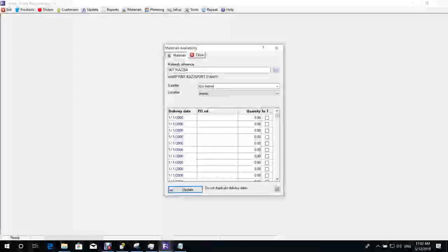It could be either a critical path activity, or we can show the material lead time in the first tab, against the material records. Those 45 days that the accessory needs to arrive into the OEB. Not standard, maybe different. Yeah, you can add it per material. You don't need to add it per PO. You need to add it per material, per bill of material.